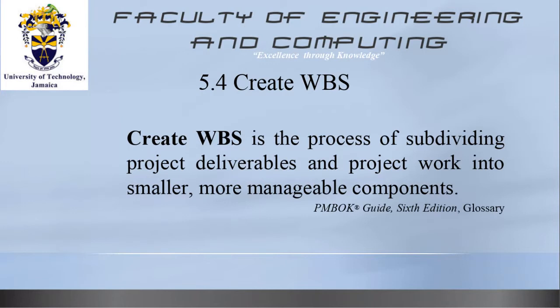So we have a strike team that is going to knock it down, cart away all the debris within 2 weeks, right? So they do that within 2 weeks. We get earth moving equipment to clear the property, because that is our scope of work in this aspect of it. To clear the property, take away all refuse from site. The site is ready for another builder or another contractor to carry out the construction. So we have disaggregated our project.